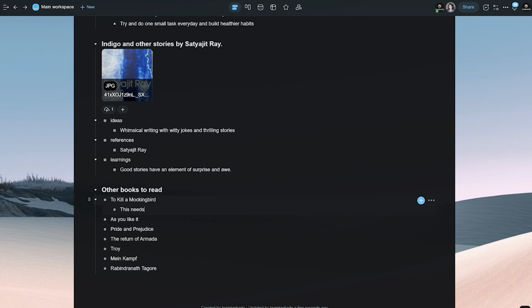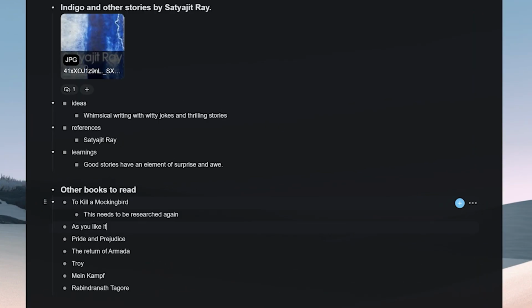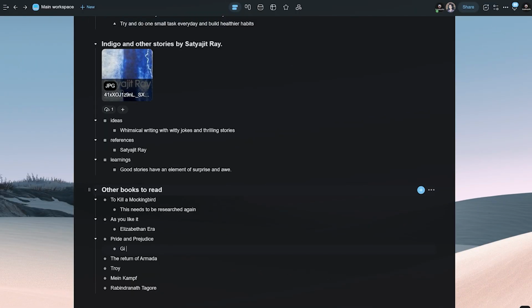Now, the process of creating an outline is similar to the other tree structures. First, you start with the primary topic that you put at the top of the page. Second, you build a hierarchy, so you add a few low-level elements under the root node to create a basic framework. Number 3, you indent lower-level elements. Indenting lower elements, or simply moving them to the right side of the outline, will reflect their position in the hierarchy. The bigger the indentation, the more detailed the element is.